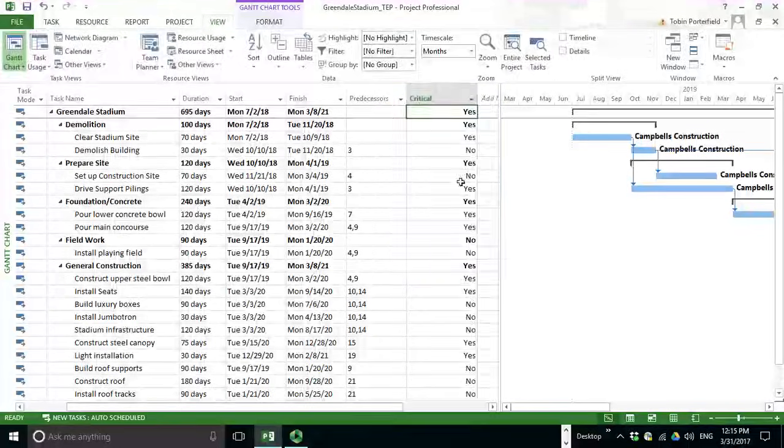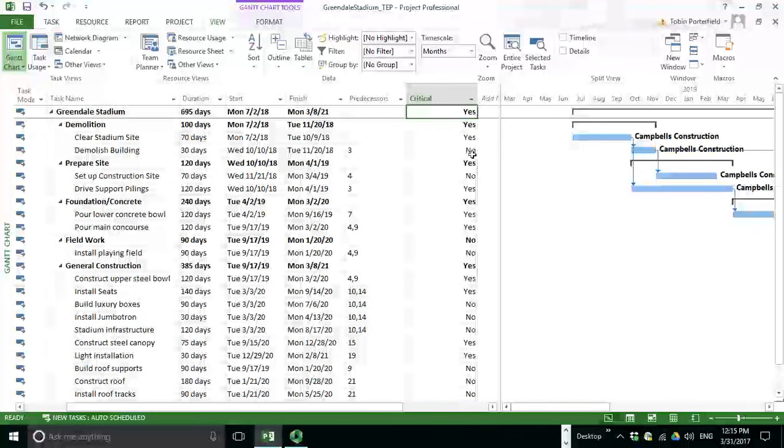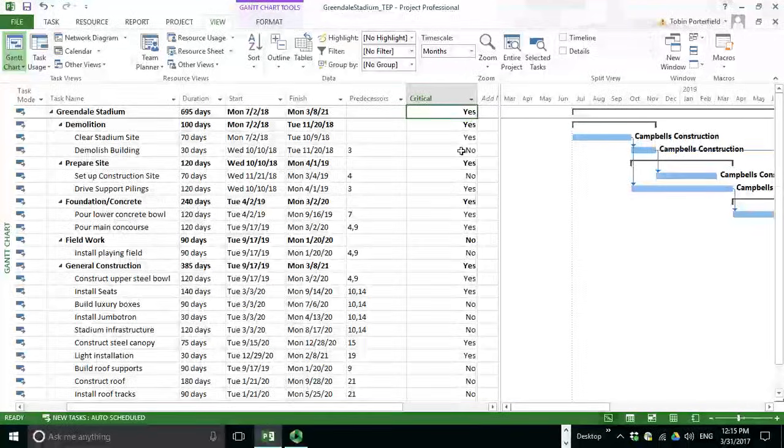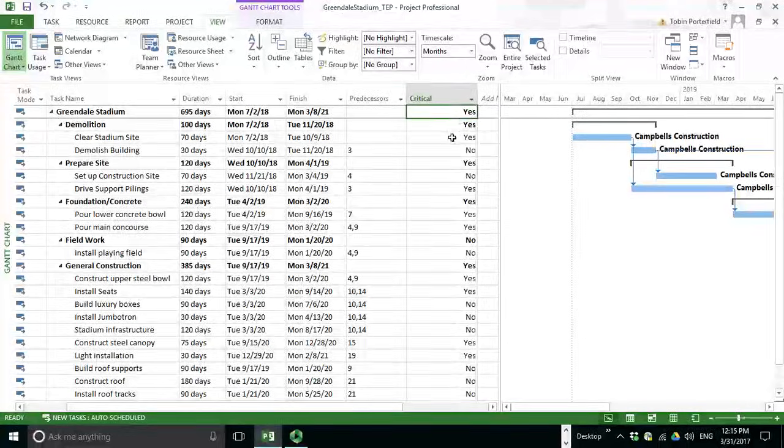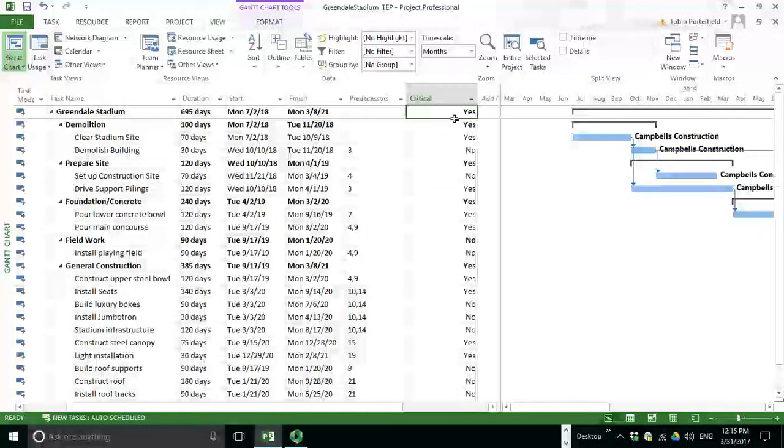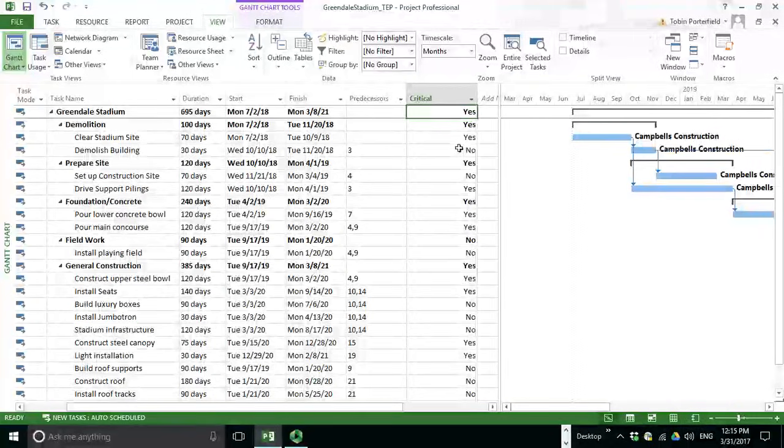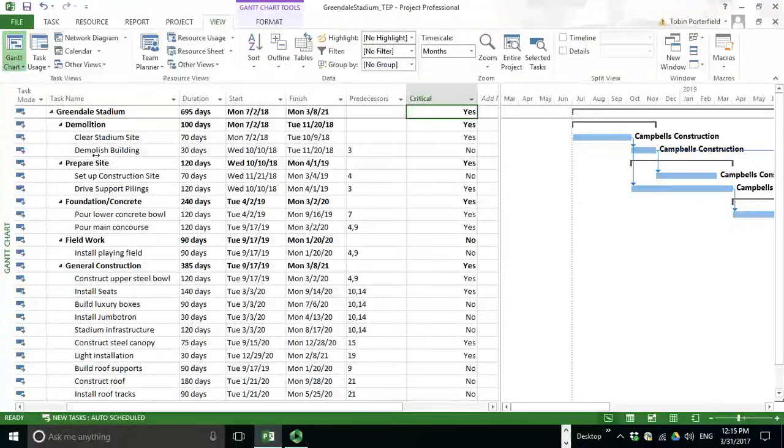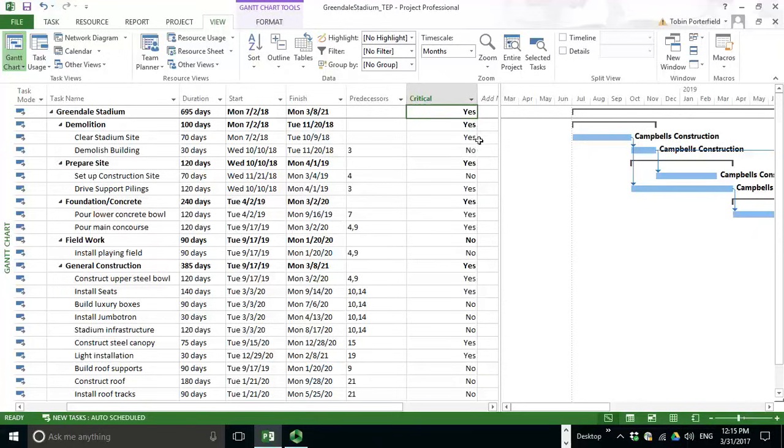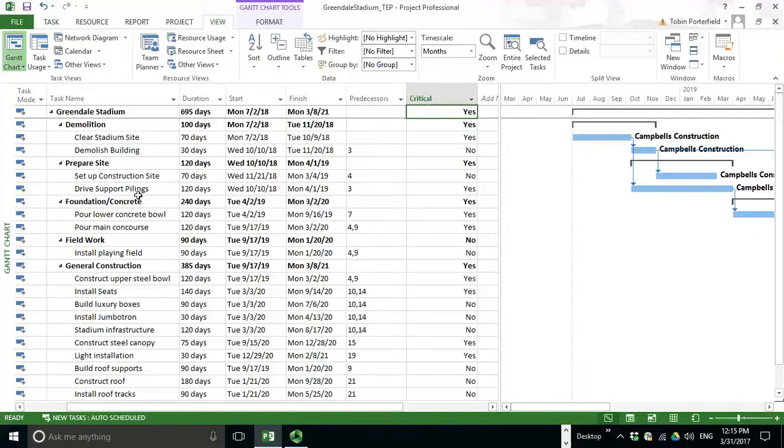If you just click on that, it'll bring forward a yes or no. Now be careful on this because the yeses also show for the summary activities and for the overall project. If an activity like Clear Stadium site is part of demolition, then it'll be marked yes and demolition will be marked yes. And in many cases, we really only want to know the actual activity so we can communicate that Clear Stadium site and drive support pile and pour lower concrete and so forth are the actual activities on the critical path.